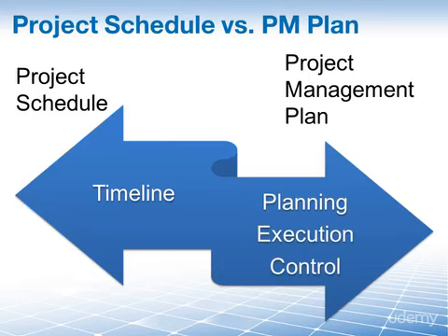Instead, when they talk about the project management plan, they are only referring to the project schedule, but not so for the PMP exam. So, to avoid confusion, for the PMP exam, the project schedule describes your project's timeline, and the project management plan is a formal, approved document that describes how the project is planned, executed, and controlled.